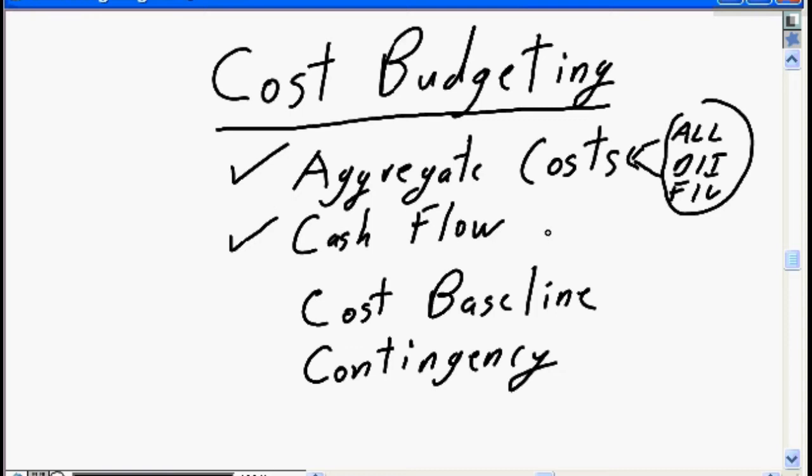You should have been prepared for this cash flow. You need to provide a month-for-month cash flow, that in this month my project will require 5. In the next month my project will require 10. In month 3 my project will require 6. But in month 4 my project will require 25, or whatever the case is going to be.